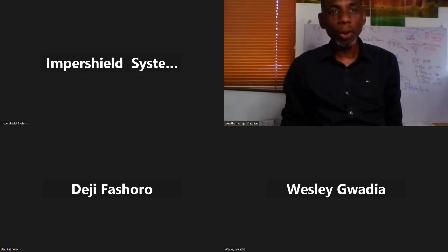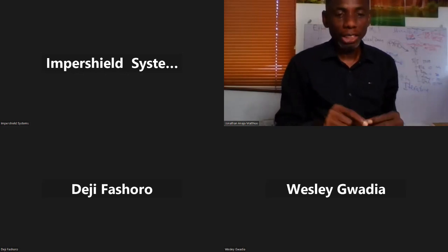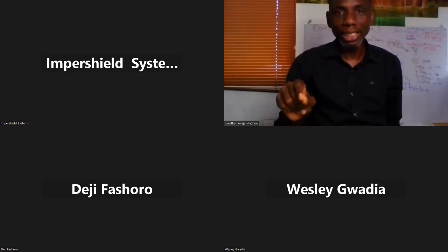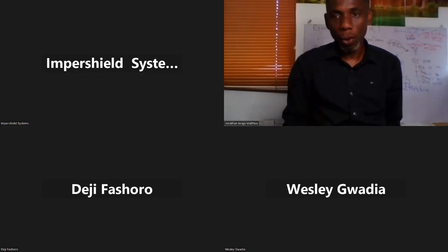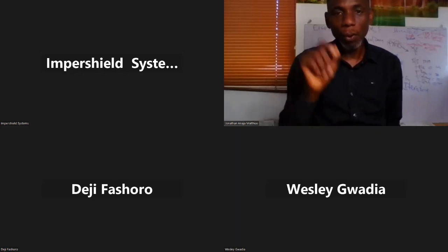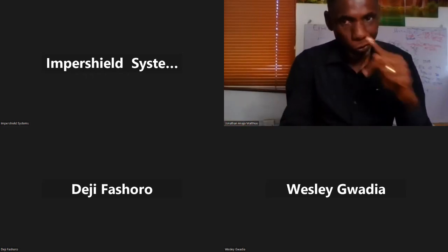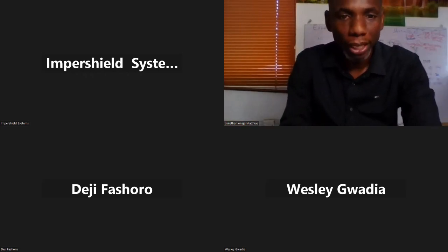What the work package does for you, how do you know whether you have achieved the work packages? Ask yourself, can I easily say how long it will take? Can I easily say how much it will cost? Can I easily say how much material or how much labor will go into it? If you are unable to say that, it's possible you've actually not gotten to the work package level.